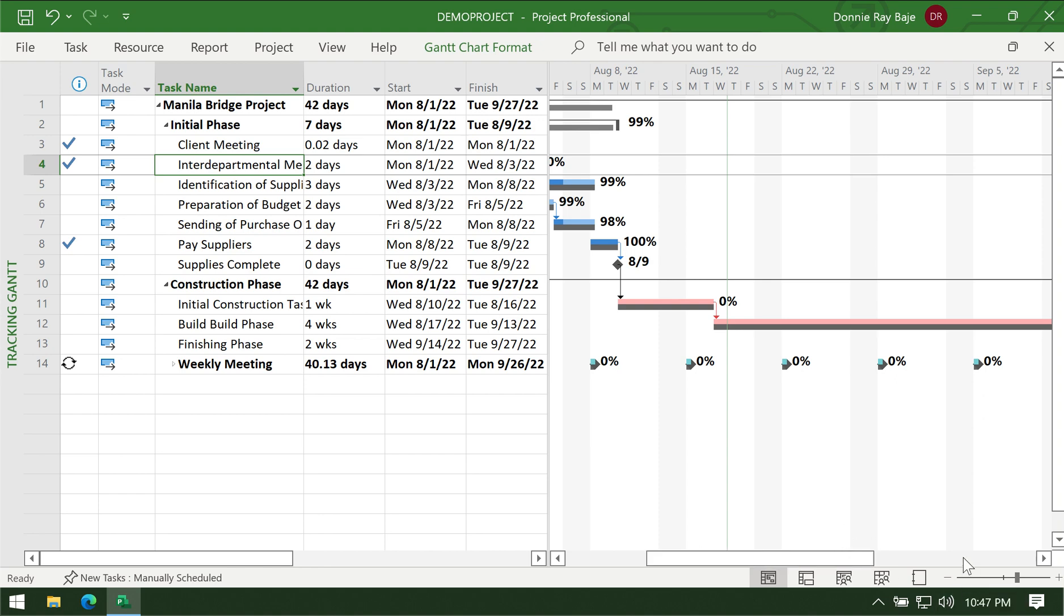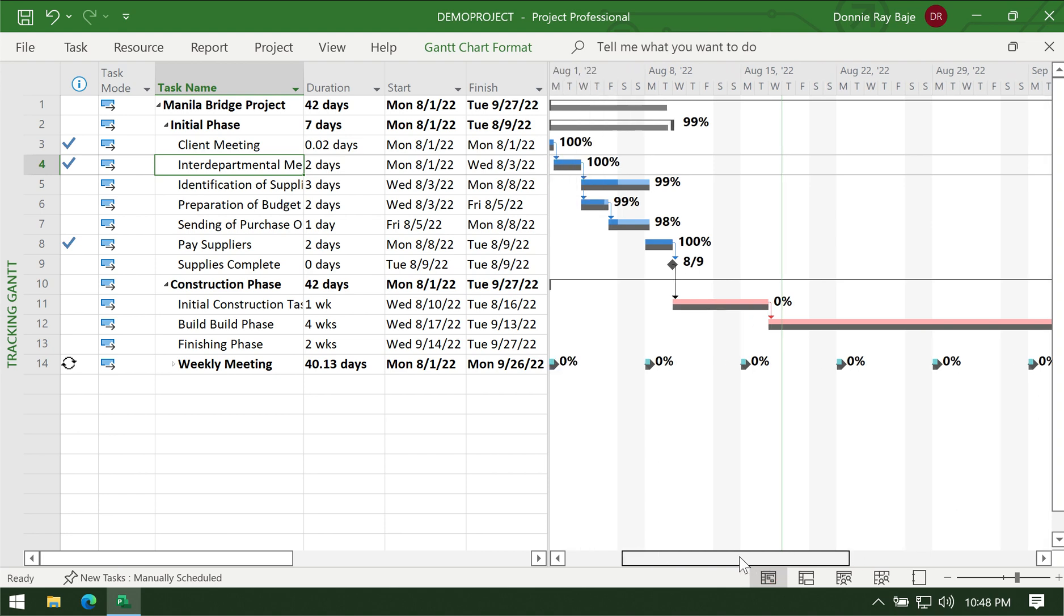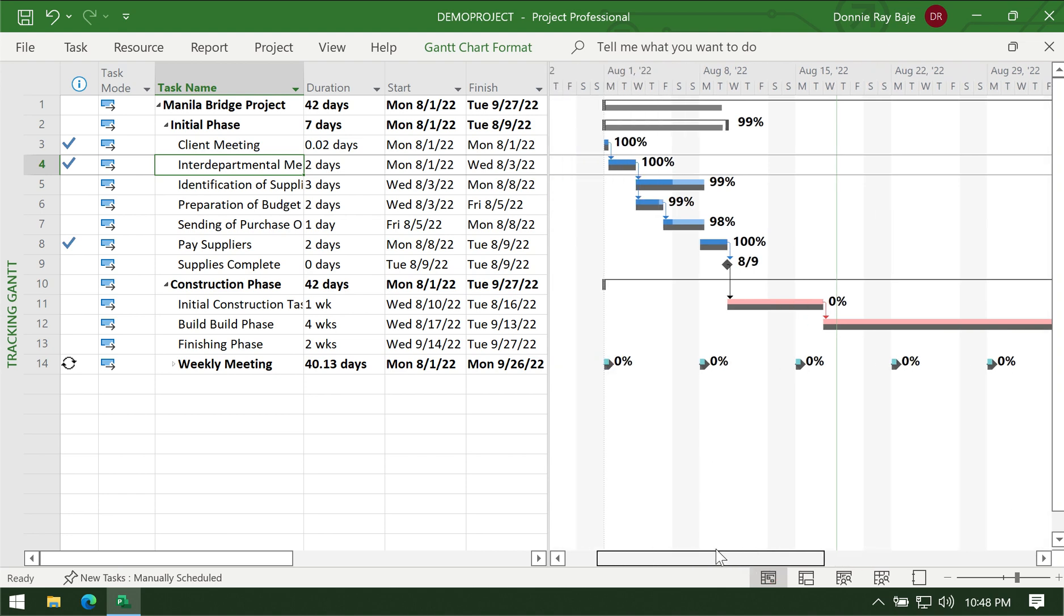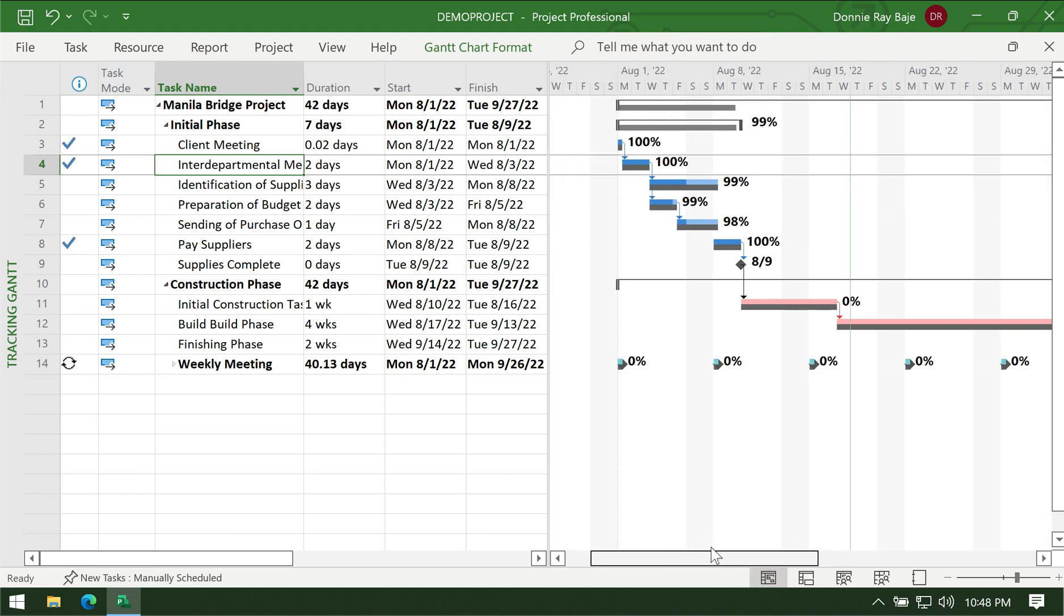Now you may wonder why some tasks here have a blue color and some are red. To give you an idea, the red or pink color pertains to your critical path. Meaning, these tasks could never be delayed because if they get delayed then it means the project will be delayed.